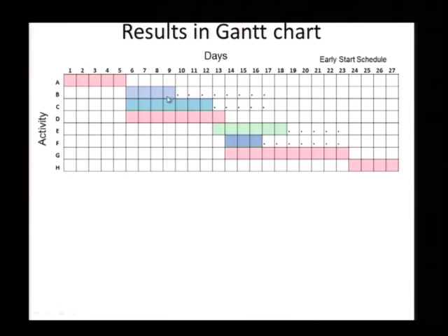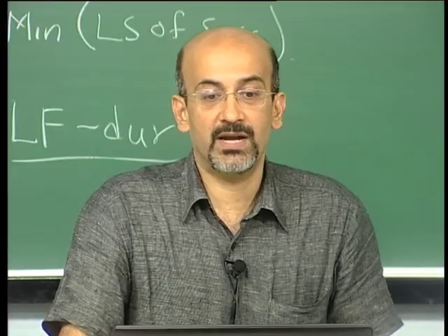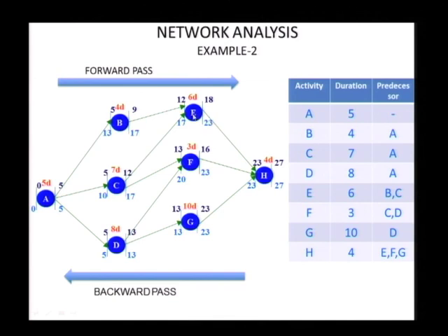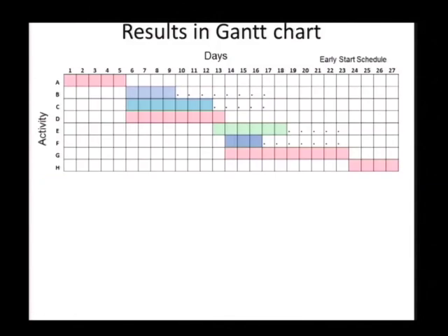But can I, for example, start moving one of these activities all the way to the end? What will be the impact? Yes, the succeeding activity will have to get delayed only then. So if I delay, for example, B, and I go back to the network, obviously it will impact E. Okay, so if I delay B here, E will also move down, right? I cannot delay B beyond a certain stage.